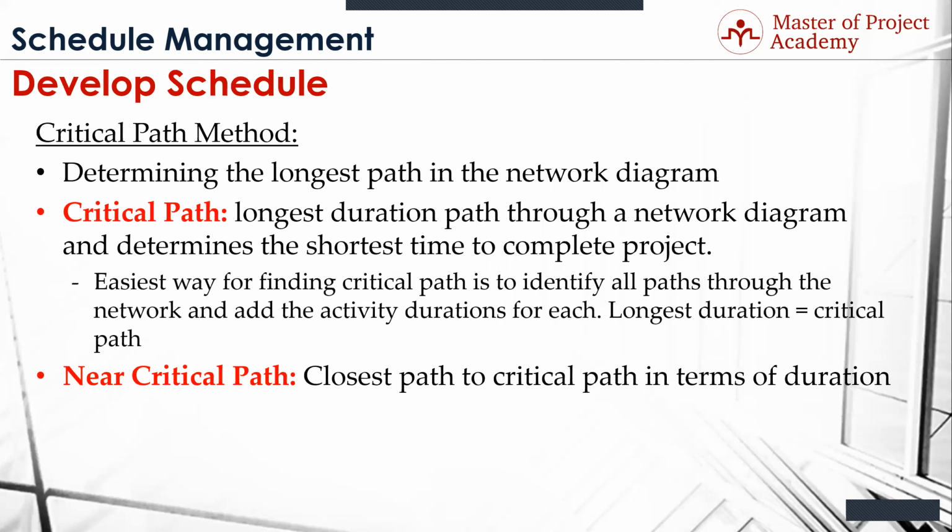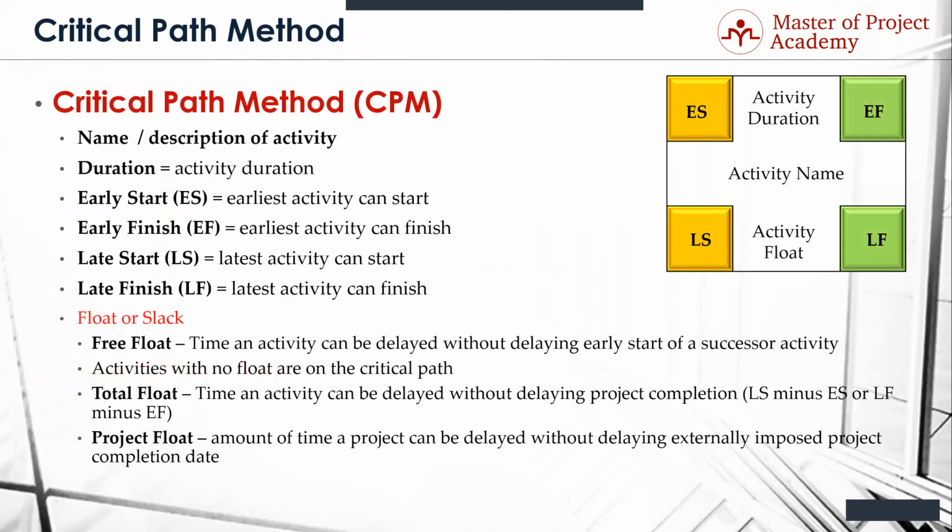Now, here's the hard part about this. These paths change throughout the project. The critical path today, after, let's say, a week goes by, based on when things are finished or changed, the critical path could change. So I was working on the critical path all last week, but now I'm not. That's absolutely a true statement. It could happen.